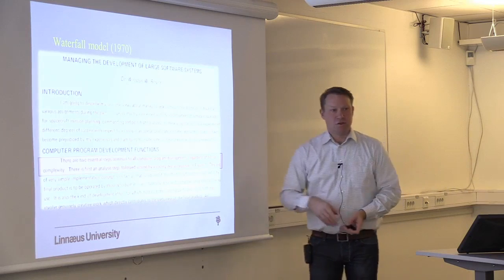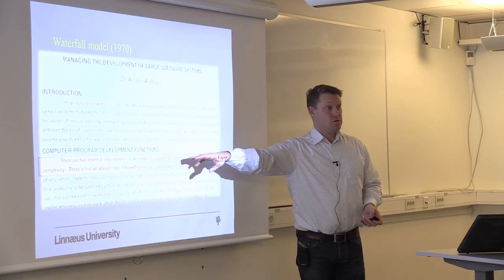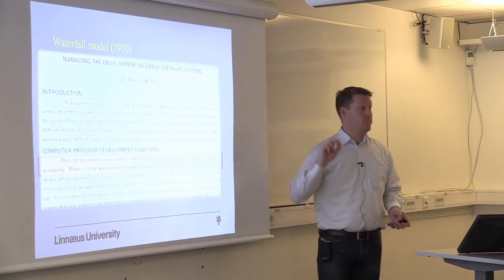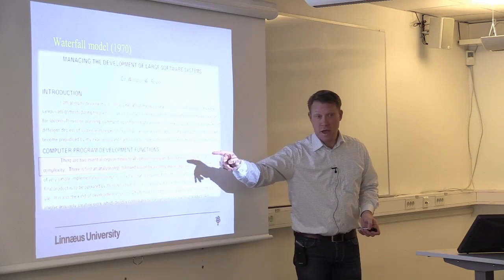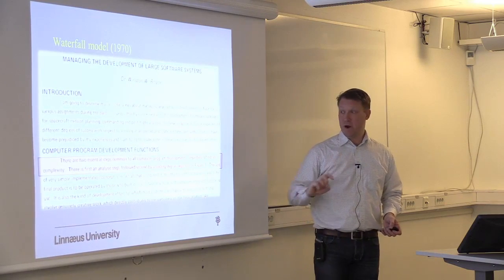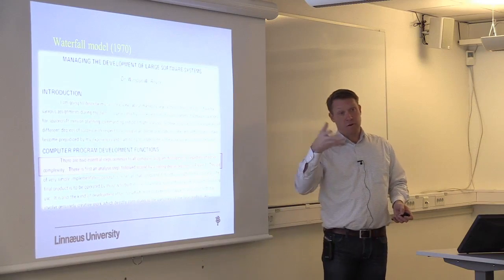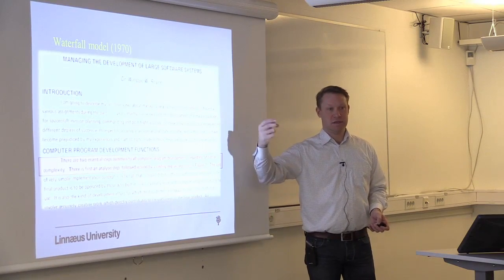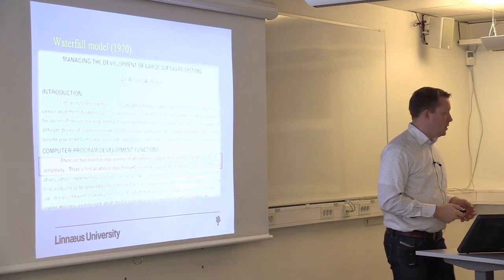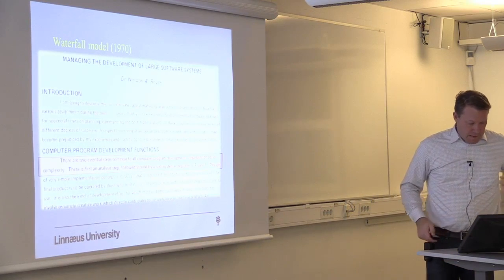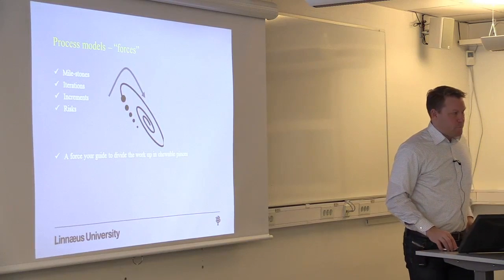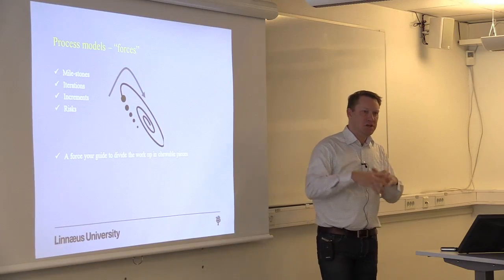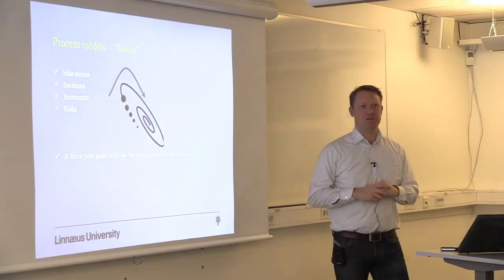As with any abstraction, you can have a look and you might find a further decomposition into the parts of analysis and the parts of coding. There you will find a step where you make sure that you have the right requirements, and a coding step that involves a design, an implementation, unit testing, integration testing, system testing, etc. So dividing the work up here is not a straightforward operation. You need to think carefully to get it right.